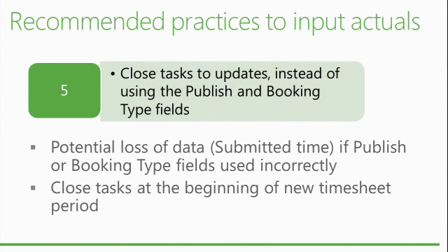Yes? If you want to use single entry mode and update that task, and you want to use administrative time, what do you do? Well, you can do both. Because single entry mode allows you to input your timesheet that is pushed into the task update. And the timesheet is the only way to have admin or non-project time. In your project plan, you have nothing for non-project time. If you can use timesheet, it's better to track all the time.